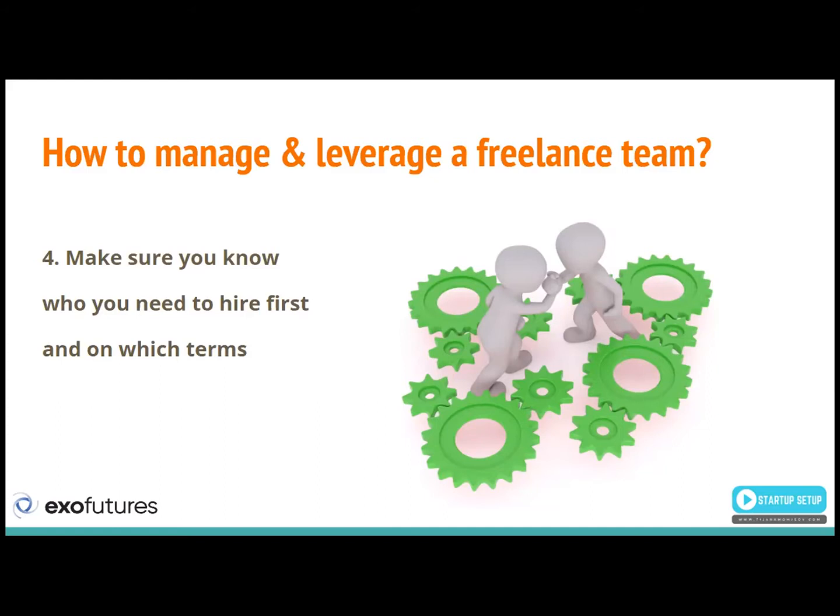This is quite a long list of roles, so I'm not going to go into the details. I have these resources in my blog post and a chapter in a book, but I'm just going to give a couple of examples. I think I already mentioned that it makes sense to work with a software architect before you're hiring the software developers. It makes sense to work with the branding strategies before you start developing any kind of graphics and then the UI.